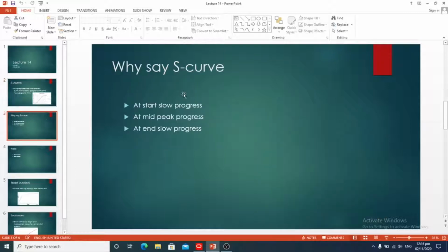Why say S curve? Well, the S curve is nothing forced or developed. It's only the shape that the graph makes when the project's growth is very slow during the early stages of the project. In the early stages, the project is starting to unravel, and the team members are just doing industry research, just starting to engage in the first phase of the project execution.